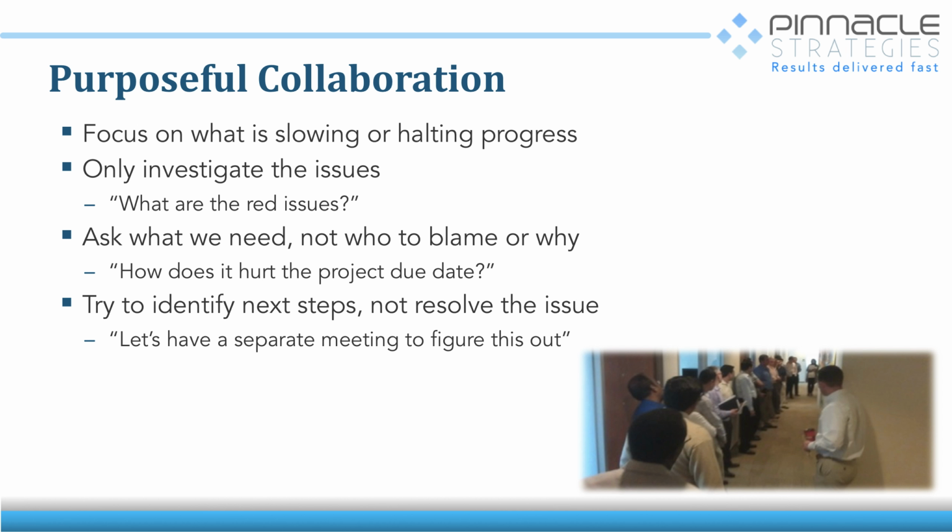So we have a stand-up meeting, and I like stand-up meetings because stand-up meetings are short. We try to identify those next steps, and we don't really resolve the issue. What we do is we assign someone to resolve that issue. Everything is about action. Every time we leave a meeting, you do this, I'll do that, she'll do this, she'll do that, and tomorrow we'll meet again.